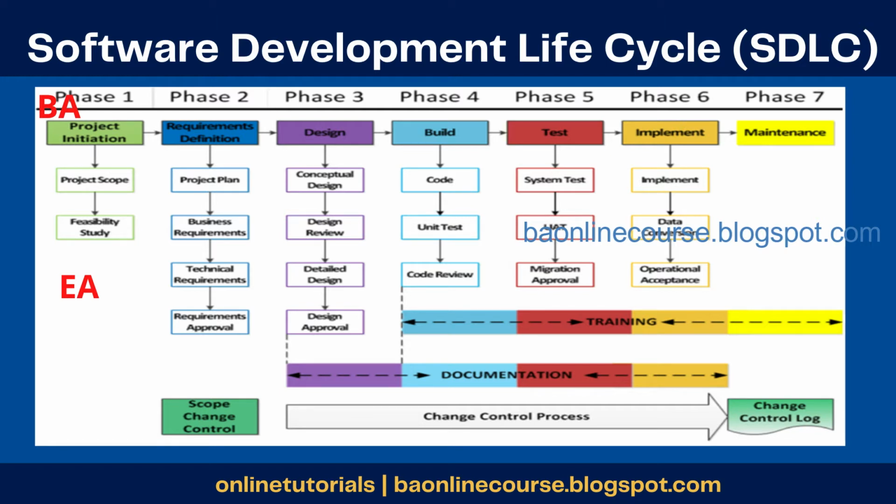Okay. And where do we generally capture those details? That's captured as part of the project plan. Okay. So once the teams are onboarded, the first activity which is done is creation of the project plan. Now, who prepares the project plan? The project managers. Okay. The project managers would sit down. They would agree on the detailed activities. They would identify the estimates, timelines, and everything, and then create a comprehensive end-to-end plan, right from the requirements till it is implemented. They'll list down all the activities, who will work on those activities.